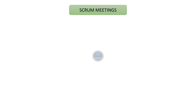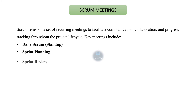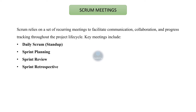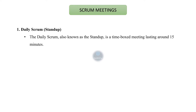The next topic is Scrum meetings. Scrum relies on a set of recurring meetings to facilitate communication, collaboration, and progress tracking throughout the project life cycle. Key meetings include the daily Scrum, also called stand-up, sprint planning, sprint review, and sprint retrospective. The daily Scrum is a time-boxed meeting lasting around 15 minutes.